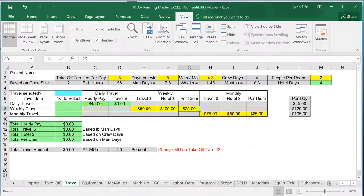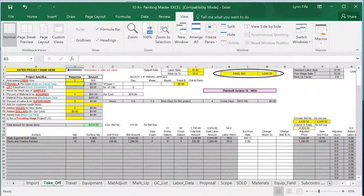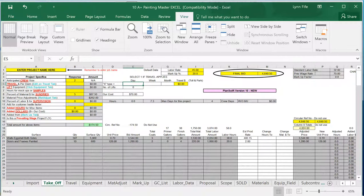Travel tab is down here where I can specify daily, weekly, and monthly, how that's going to be calculated out so that on the Takeoff tab, all I need to do is put an X in that column and tell it daily X here, and it will automatically calculate for me exactly how much to allow for travel and per diem.